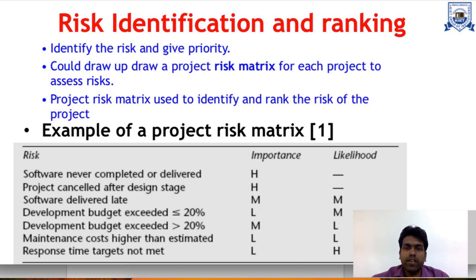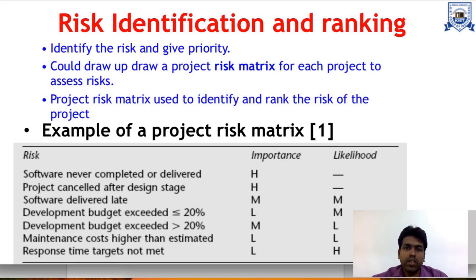Coming to the identification and ranking of risk. First we identify the risk, then provide the priority based on how much it is going to affect the project. We can draw a risk matrix for each project to assess the risk, providing the weightage or ranking of each risk — higher, medium, or lower priority — along with the likelihood that the risk will occur in the future.